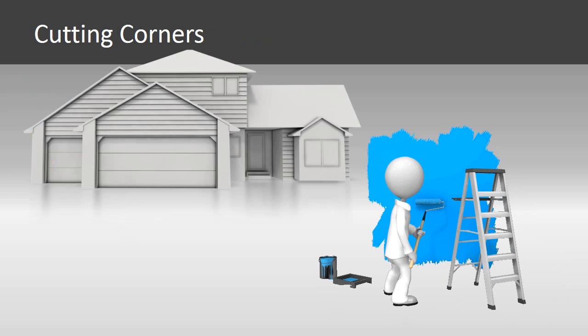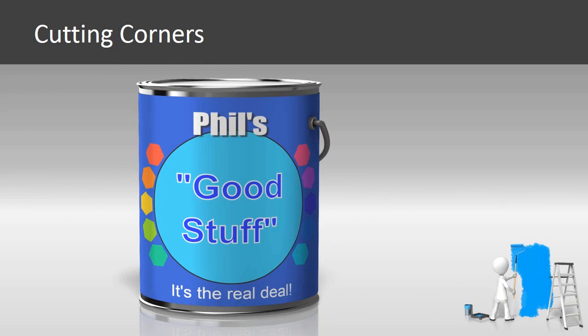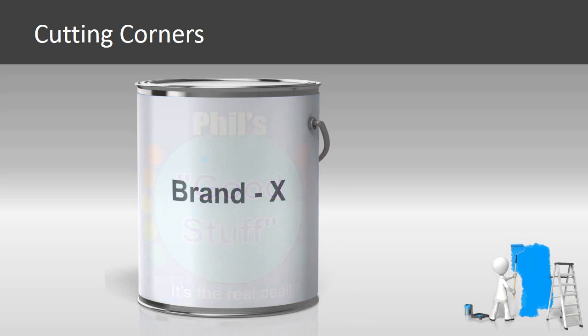The homeowner doesn't like the quotation and wants to reduce costs. Painting the house trim is definitely within scope, so he cannot cut corners that way, but there are no constraints as to what kind of paint to use. So the contractor decides to use an inexpensive paint. This will affect project quality because brand X won't last as long, and the owner is likely to be very